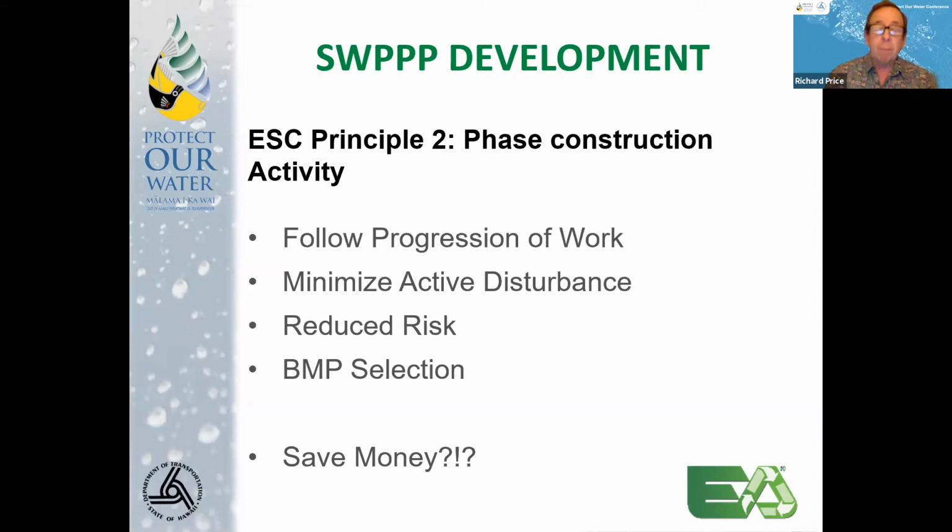There's a little more thought and planning that goes into this because you need to have that phase construction thought out ahead of time. And then you need to work with whoever's developing your SWPPP, whether it's one of your staff or a consultant, and make sure they understand your construction phasing and that they can phase the SWPPP accordingly so that you don't have to go back and revisit and revise your SWPPP continually because you already have it. Phase 1, this is what it's going to look like. Phase 2. So you may spend a little bit more money on your SWPPP, but it'll save you money and reduce risk in the long run.